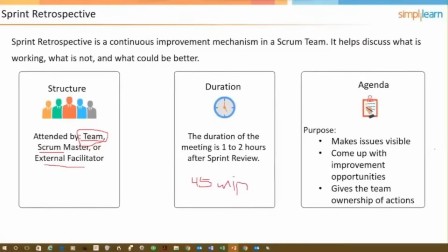This is where continuous improvement is going to happen. Continuous improvement is the result of other things, but this is the main thing. And if you were to get a question about the relevance or the necessity of retrospectives, there is no equivocation. You do a retrospective after every sprint. If you don't do one, then there's no improvement. Things just stay static.